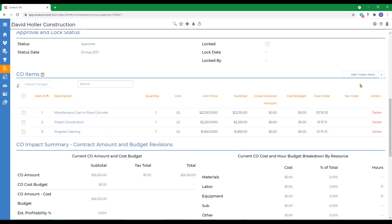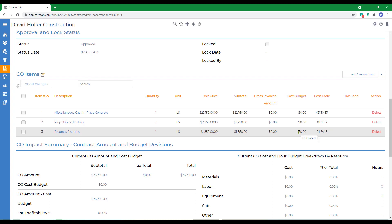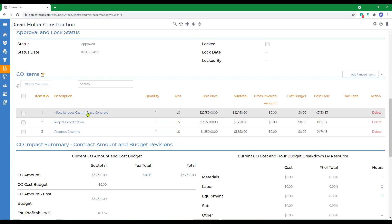Using that particular method only adds a unit price, or the amount we're going to charge the customer, client, or project owner. It does not add the budget. The budget is, however, very important, especially when calculating percentage complete. So we'll go back and add that as well.